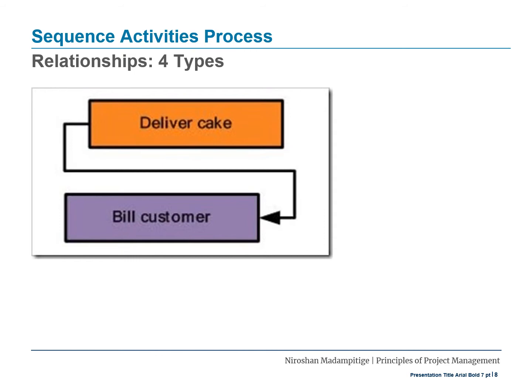Going back to our wedding cake example, let's say you have a task for billing the customer. It begins when the customer requests the cake, but it can't be completed until after the cake delivery has begun. You can use a start to finish dependency between the deliver cake and bill customer tasks so that when the deliver cake task has begun, it's okay for the bill customer task to finish.